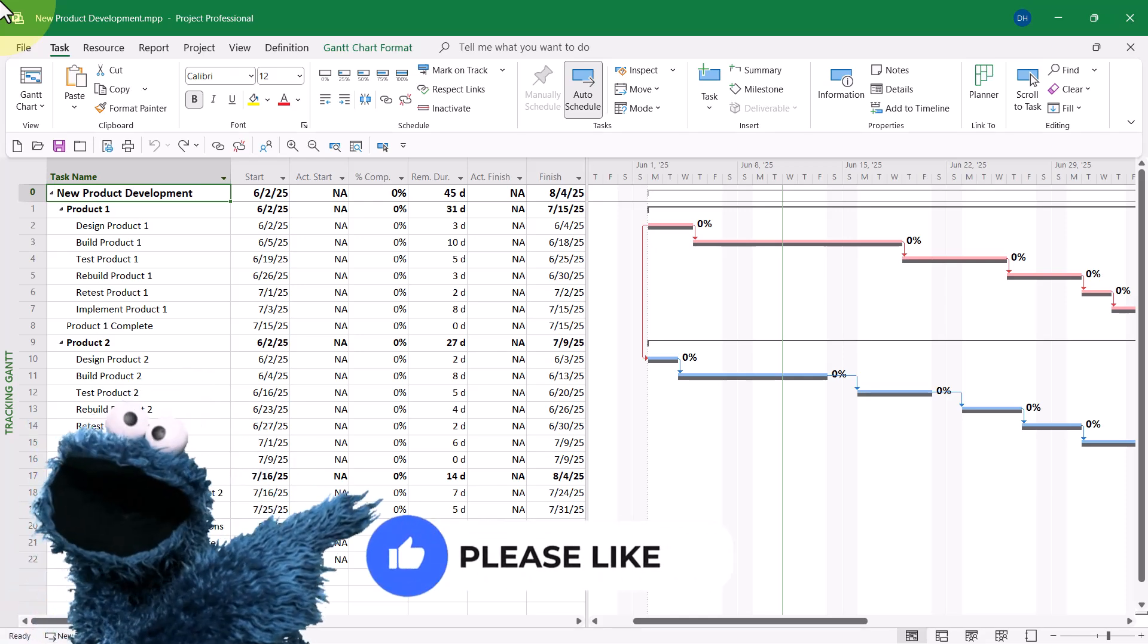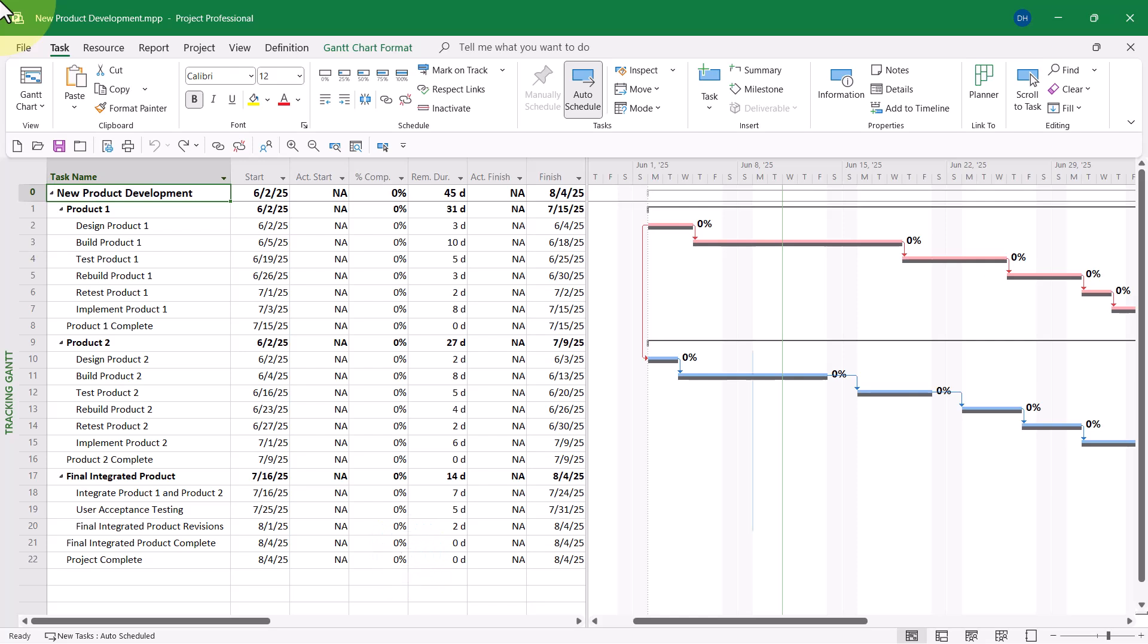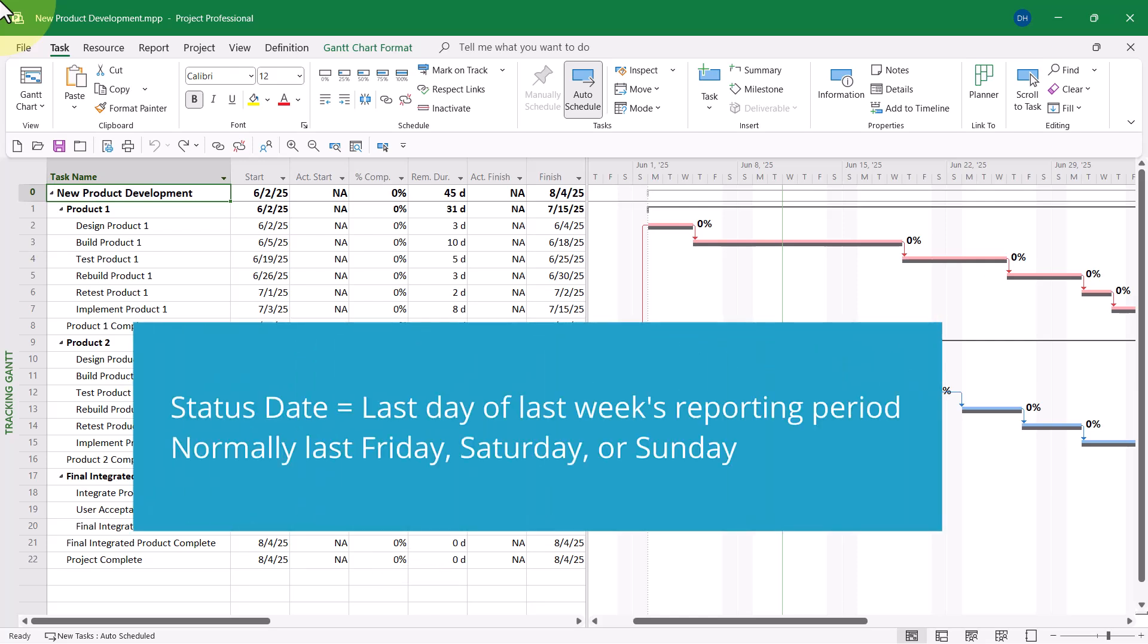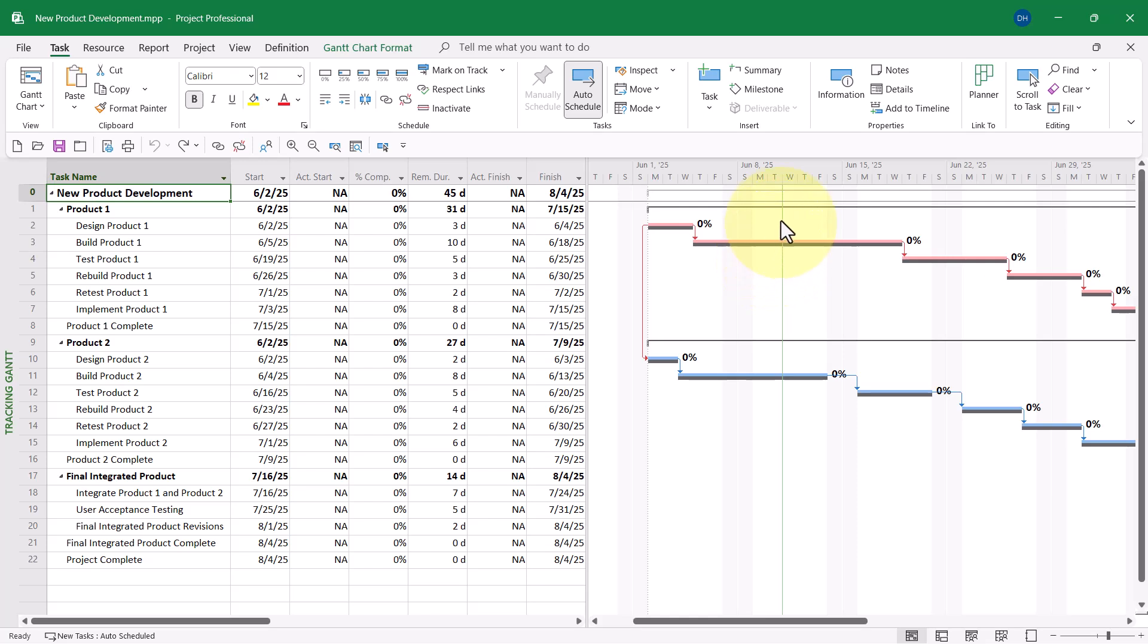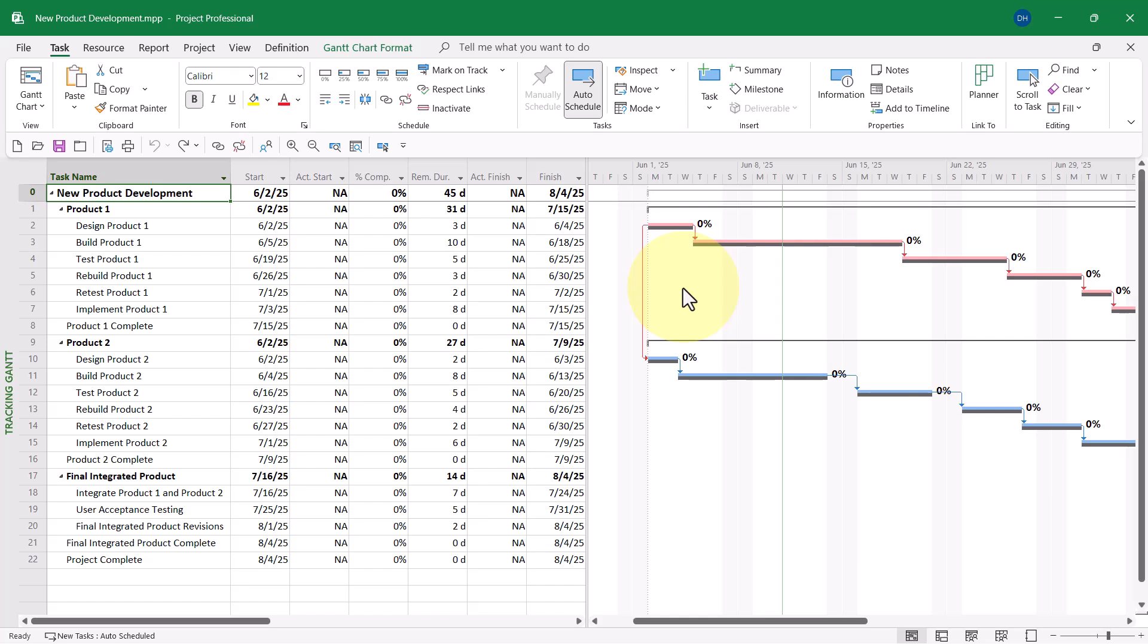But you're probably wondering, so Dale, what is the status date? The status date is the last day of last week's reporting period. If you notice the thin green grid line here in the tracking Gantt screen, this is actually on Wednesday, June the 11th. So, the current week is the week of June the 8th. Therefore, the last reporting period is the week of June the 1st. The last day of the week of June the 1st can either be Friday, June the 6th, Saturday, June the 7th, or Sunday, June the 8th.